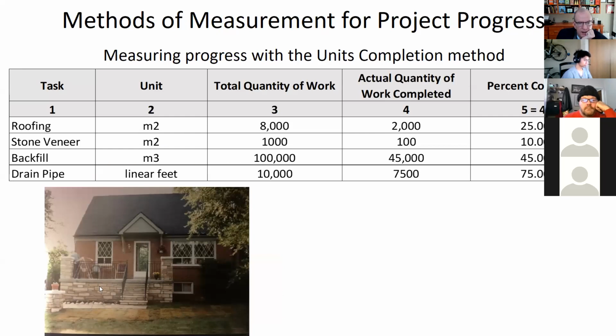You could have a value placed on it by area, how much total area you have to do, and how much you've done. Natural stone was usually bought by the ton, and then it was assumed you'd get so many square yards out of the ton.